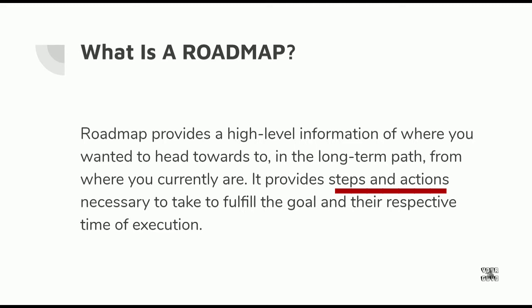Second is the set of actions. Your set of actions might be in the form of documentation. You want to deliver certain documentation at this specific time during the roadmap, or you want to deliver a product and whatnot. Just make sure that whenever you put an action, it is paired with the corresponding point person, if not a point person, the department or the team who's going to deliver or execute that specific action. And the last one is the time.